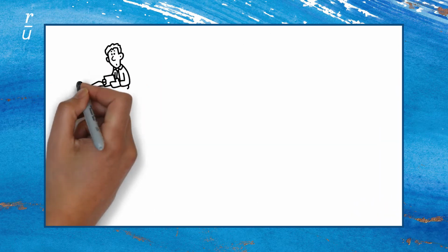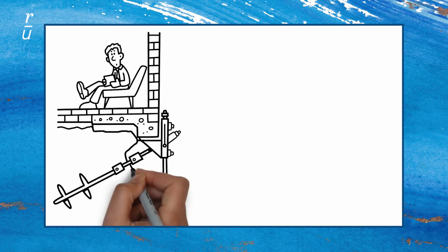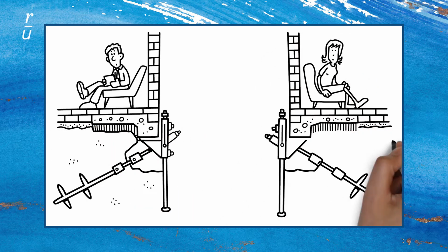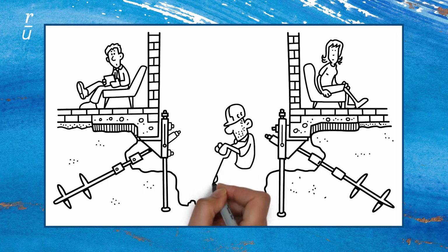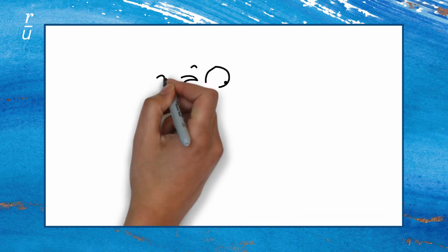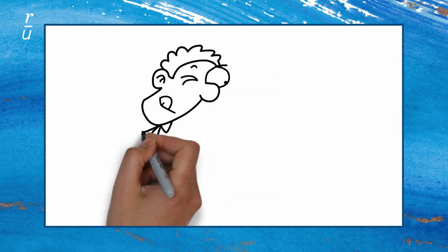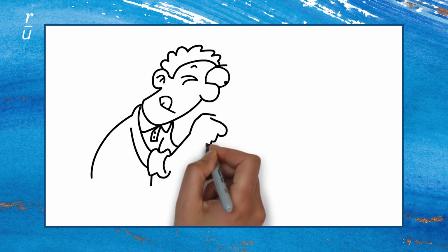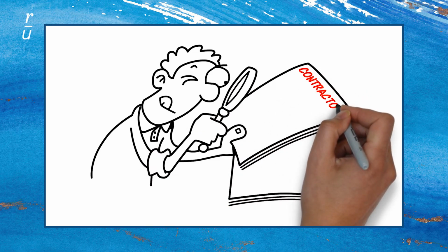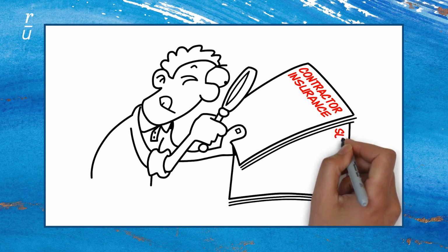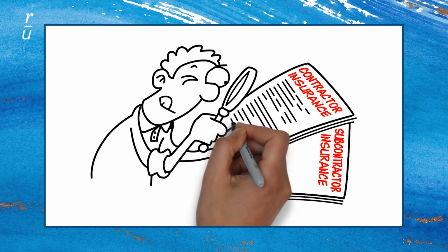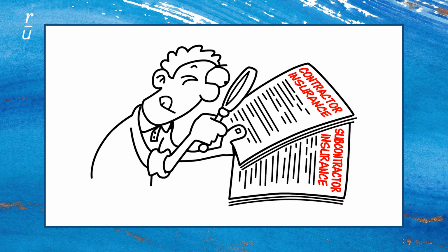If you decide to dig down, perhaps creating or using a cellar as subterranean space, your exposure increases dramatically. These types of work often require piling, shoring up, and excavation. Party wall insurance only covers non-negligent works. It doesn't insure when negligence can be clearly established. Before undertaking these complex operations, check your contractors' and your subcontractors' insurance to make sure these works are not excluded.